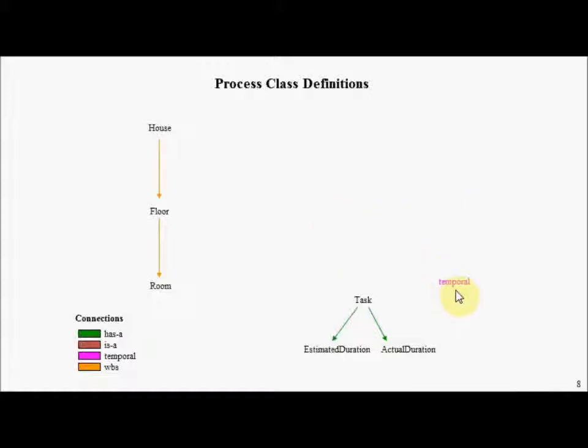And we'll introduce a new kind of connection here called a temporal connection. And here we're doing something different, something we haven't seen in any other presentation. We're going to introduce an attribute associated with a connection called delay. And we're going to introduce an entity here called T9, which is a task. Similarly, we're introducing this thing called T10, and T10 is a task. And we're going to create a temporal relationship between T9 and T10, meaning in order to start task T10, T9 must first complete.